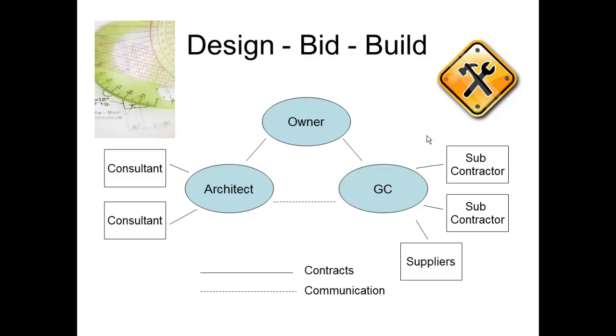And in most cases, especially with a university where we're using public funds, we need to make sure that the specifications are open enough that we don't make an item a proprietary item. We have to always put in the note "or approved equal" in our specifications, so that it gives the opportunity for another contractor or subcontractor to come in and say, we've got this product, we think it's equal, we'd like you to take a look at it. If you think it is, do you think we can bid it?